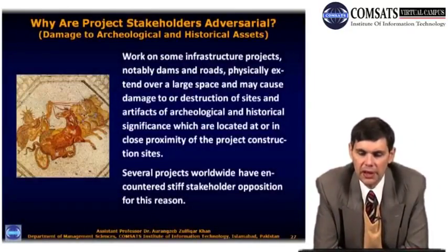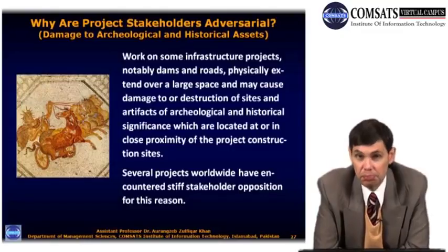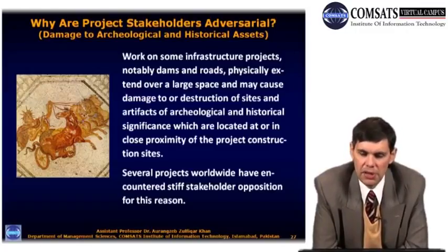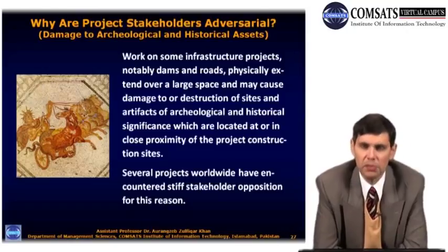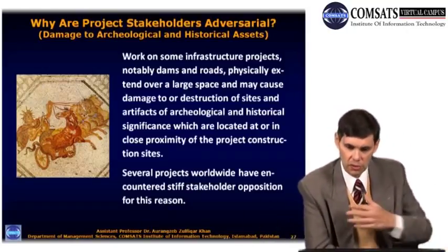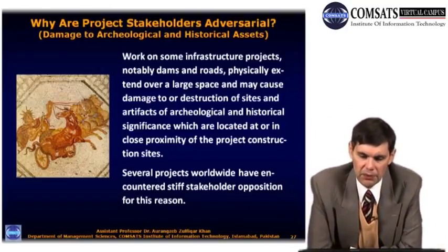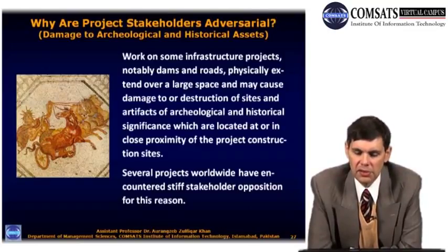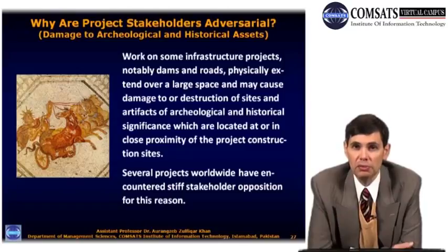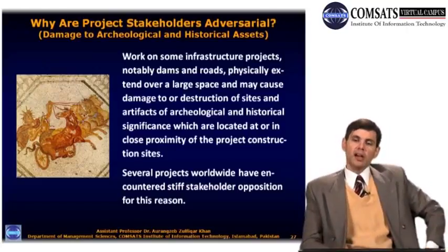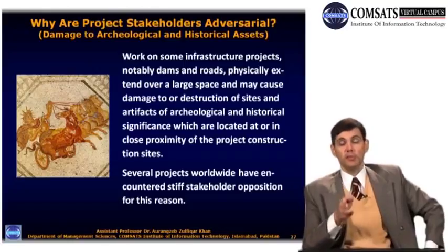Damage to archaeological and historical assets. Well, there are some projects, again larger construction type, civil engineering type projects, which can cause damage to such assets, especially dams, because they take up a lot of physical space. Roads also take over a lot of space in length. And there are a lot of archaeological historical sites in many countries, Asia, Europe, all very old cultures, going thousands of years back. And more often than not, one comes across some archaeological site. Actually, many archaeological historical sites have been discovered as a result of such projects.